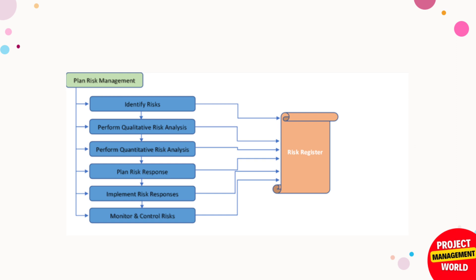Now let's see the steps to perform a risk register. Under plan risk management, the first step is to identify risks. Then we perform qualitative risk analysis — a subjective analysis giving a rating for probability and impact. If needed, we also do quantitative risk analysis, which quantifies the values from qualitative analysis. After that, we plan risk responses, then implement those responses, and finally monitor and control the risks.